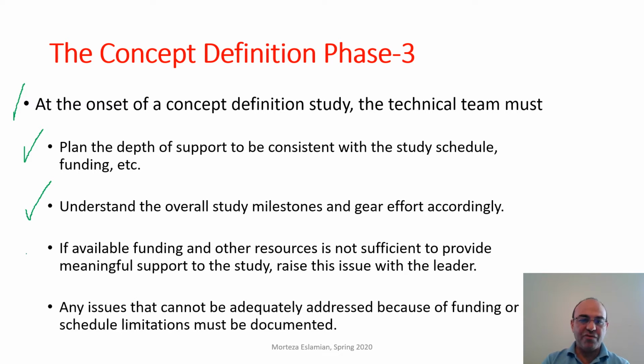So if available funding and other resources are not sufficient to provide meaningful support to the study, this should be raised with the leaders so that they know that additional funding or additional technical support is needed, so that the company can go ahead and hire new people or dedicate more funding, and so on. And any issues that cannot be adequately addressed because of funding or schedule limitations must be documented.